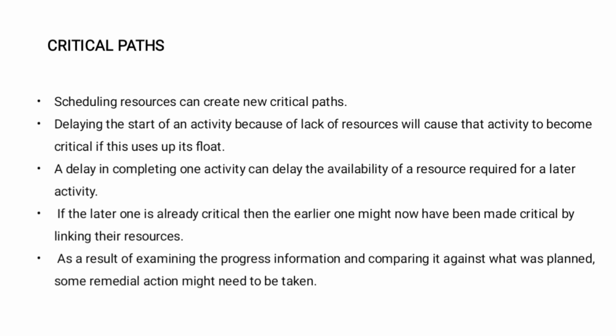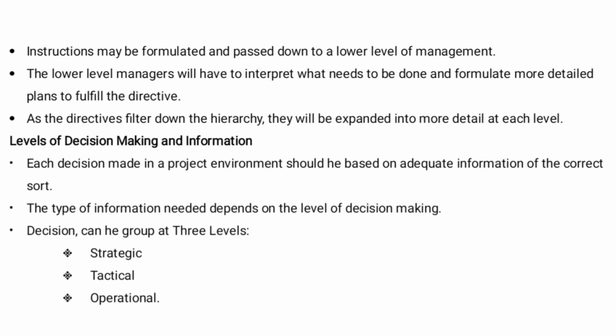As a result of examining the progress information and comparing it against what was planned, some remedial action might need to be taken. Instructions may be formulated and passed down to a lower level of management. The lower level managers will have to interpret what needs to be done and formulate more detailed plans to fulfill the directive. As the directives filter down the hierarchy, they will be explained in more detail at each level.